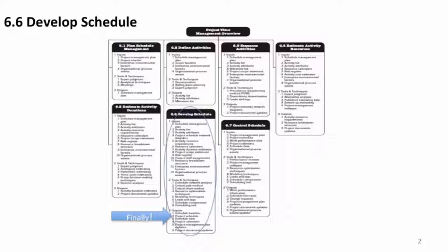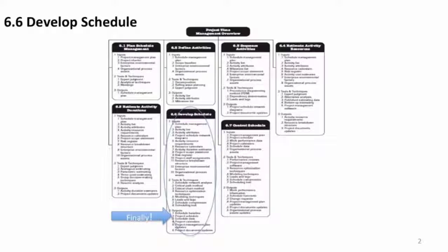Then in 6.4, we've assigned resources to those activities, be it people or materials or subcontractors or whatever, that we need to execute that activity. And then finally in 6.5, we applied the time duration to accomplish each one of those activities by the assigned resource. Now, finally, as you can see way down here, is another indication of why you shouldn't sit down right away when you get a project charter and start cracking out a schedule. It's way down here after all this fundamental, best practice stuff that goes first. And now finally, we'll be able to produce our actual project schedule.